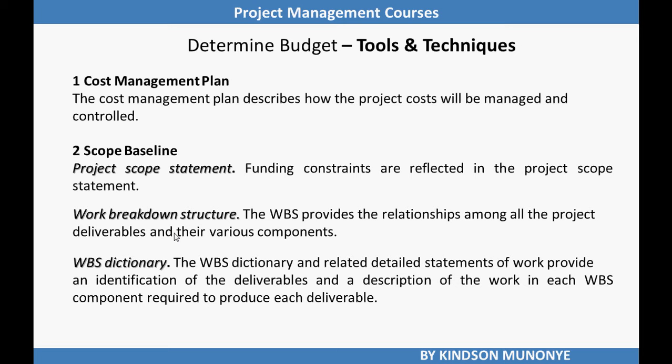The work breakdown structure provides a relationship among all the project deliverables and their various components. The WBS dictionary and related detailed statement of work provide an identification of the deliverables and a description of the work in each work breakdown structure component required to produce each deliverable.